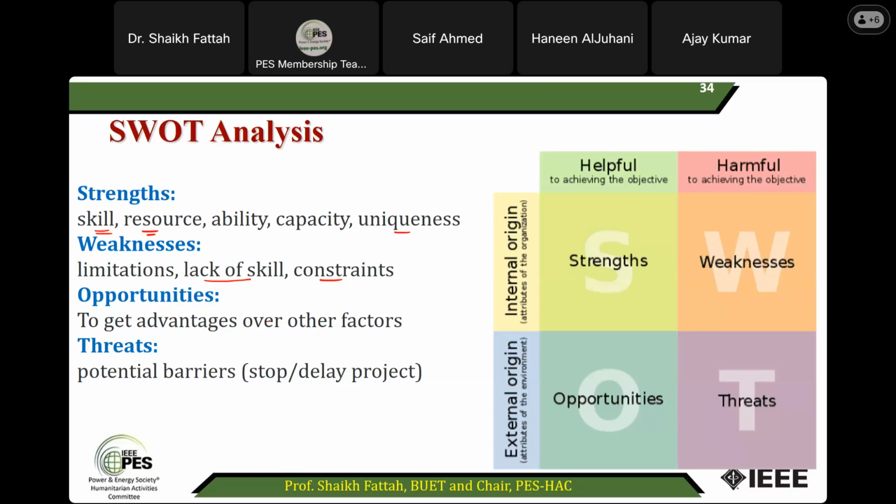At the same time, you are trying to solve one problem, but there may be a problem like other people may be affected, so they will be in danger. They will think that okay, if you are implementing this type of solar based power system here, they were used to sell fuels, so that will be reduced and they will be scared, and they may be creating problems.